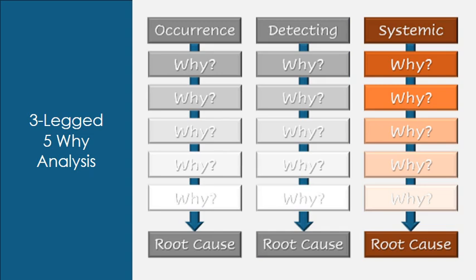And Leg 3. Systemic, the management or policy cause. Focuses on the overarching company guidelines, training gaps, or structural systems that permitted the condition to exist or recur. Ask why did our standard systems, training frameworks, or policies allow this risk to persist?